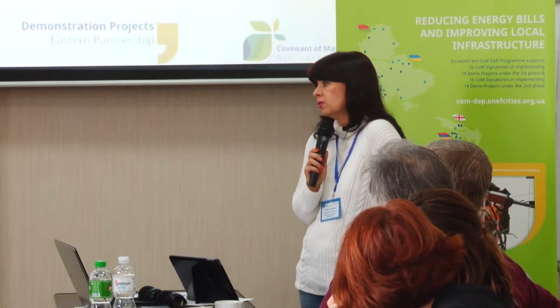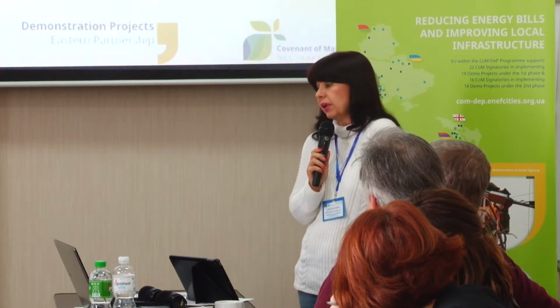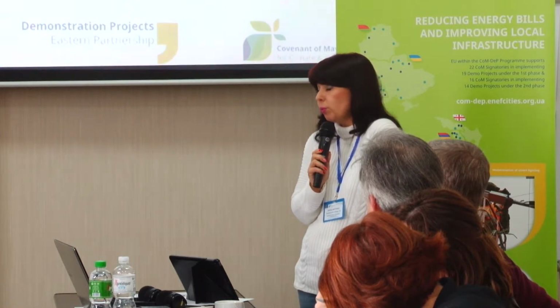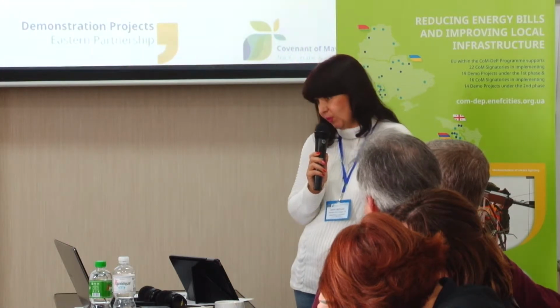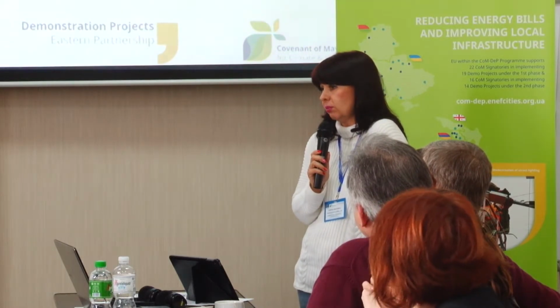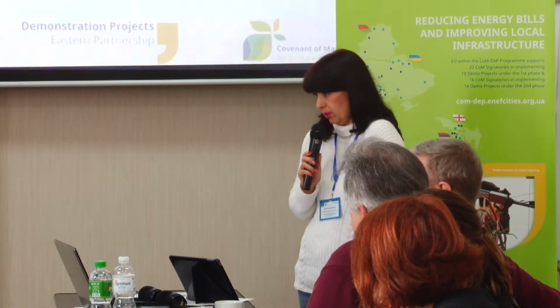Now, the Ukrainian legislation has it that technical design documents for capital repair should undergo comprehensive examination. There used to be only examination for the part of bills of quantities, and now the legislation has, in inverted commas, become more simplified, and we need to undergo complex, comprehensive examination, which may run up to 3 months or even more. 3 months is the best case scenario.